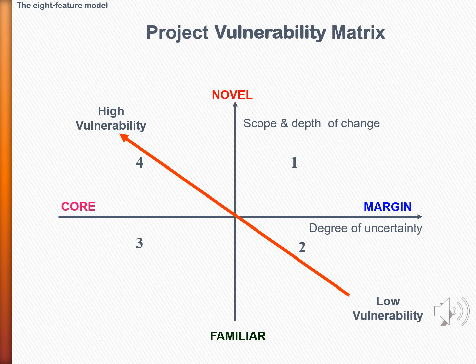The visibility of the project is connected to the level of vulnerability of the project. Vulnerability of the project is the scale and complexity of problems facing the project manager. It is related to the degree of uncertainty and risk involved in the project. This idea of vulnerability is important because we can anticipate the degree of resistance that the project is likely to generate, and the number of difficulties or issues that may appear during the development of the project.